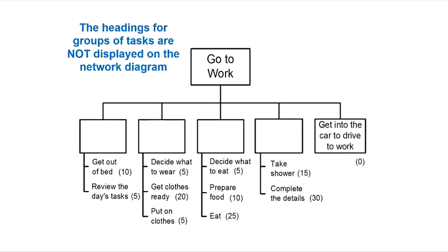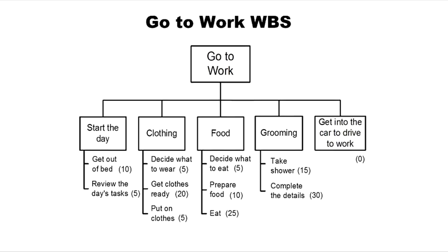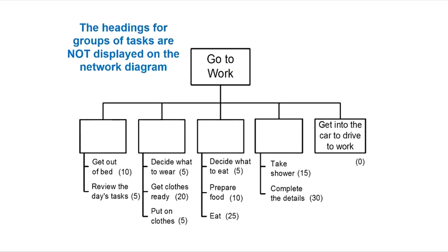When we put our schedule together, we're going to find that the headings go away on a network diagram. We don't put the headings for tasks. We're not going to get out of bed, review the day's tasks, and then go start the day. Get out of bed and review the day's tasks are start the day. So start the day isn't going to be a task we put on our schedule. These are the tasks that go on the schedule.